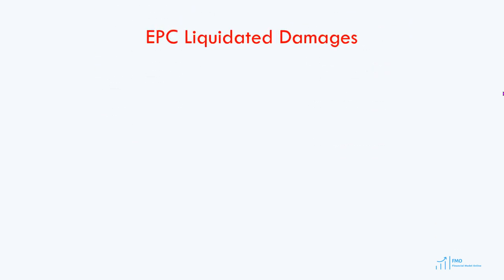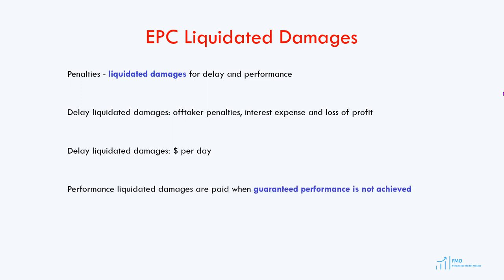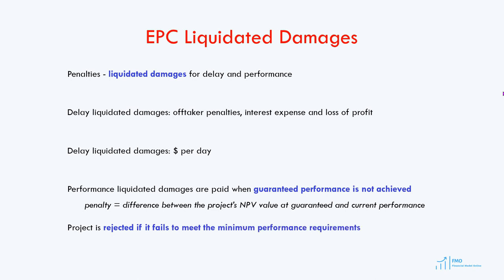Another distinctive feature of the EPC contract is delay and performance penalties, called liquidated damages. Since the EPC contract is date certain, if there is a delay in construction, all penalties owed by the sponsor to third parties will be paid by the EPC firm. Delay damages include penalties paid to the off-taker, debt costs paid to the lender, and loss of profit suffered by the project company due to the delay. Delay liquidated damages are based on a dollar-per-day calculation. In addition, there will be performance liquidated damages if the project does not achieve the guaranteed performance level — typically calculated as the difference between the value at the guaranteed performance level and the actual performance level. The project company has the right to reject the project if it does not achieve the minimum performance level, and a typical penalty for rejection is reimbursement of all cash payments made to the EPC contractor.